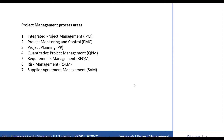The 7 project management process areas are: 1. Integrated Project Management, 2. Project Monitoring and Control, 3. Project Planning, 4. Quantitative Project Management, 5. Requirements Management, 6. Risk Management, and 7. Supplier Agreement Management.